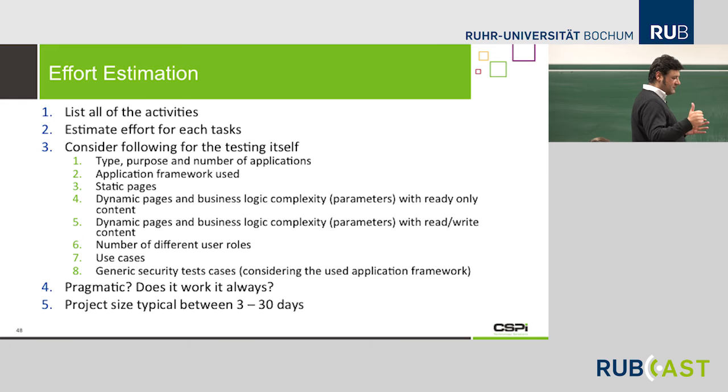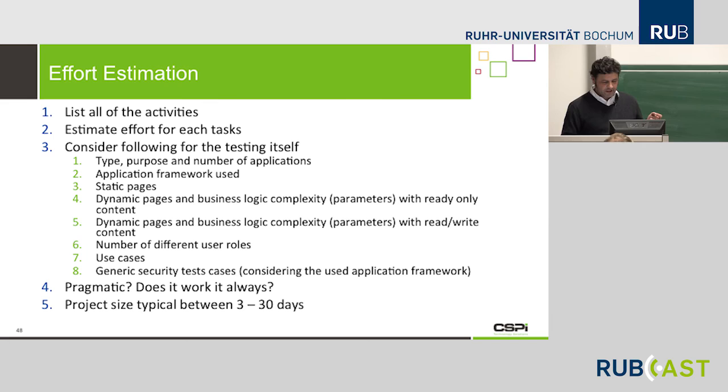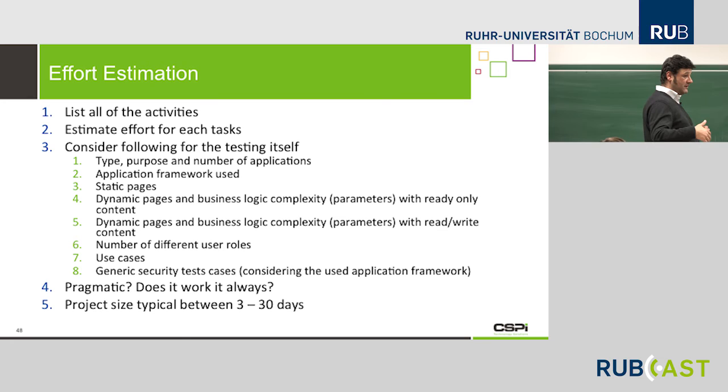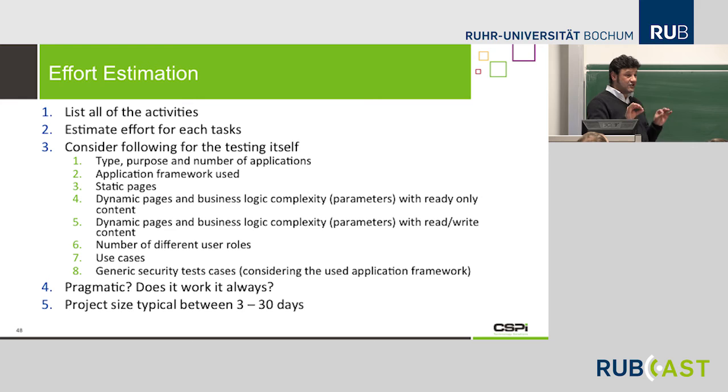So these steps are: first of all, list your activities, starting from preparation, vulnerability scan, detection of some flaws or open ports. So start from that point and list down all your activities first of all, and then estimate the effort for each task, and then you can drill down for each task how long you need.